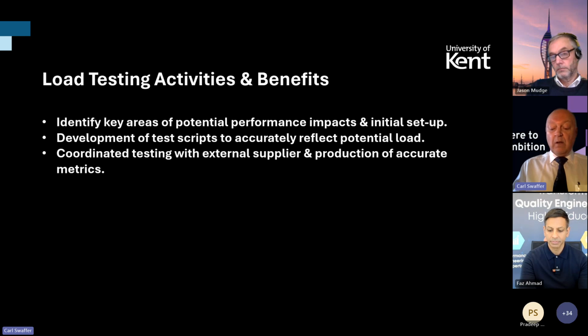Coordinated testing. When it came to the actual load testing, we were able to prepare the test environment so that testing would be as smooth as possible. For example, various test data and dummy user accounts set up and database restore point backups taken. With dedicated Microsoft Teams channels set up, we were also able to monitor and communicate quickly in real time as testing took place and jump on the occasional issue quickly as required. Although a full final test report was an agreed part of the package of work, we received regular interim updates after each test had completed, so we were able to measure progress quickly.